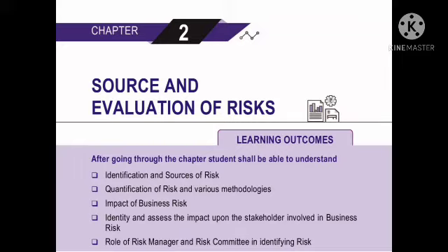While the cut-off criterion for the public event is 65%, the idea of having a public event can be cancelled. According to the calculations, the risk for holding a public event is very high. It may never succeed. Risk management is done from very early in the project until the very end. Risk quantification involves evaluating risks and risk interactions to assess the range of possible outcomes. It is primarily concerned with determining which risk events warrant response.